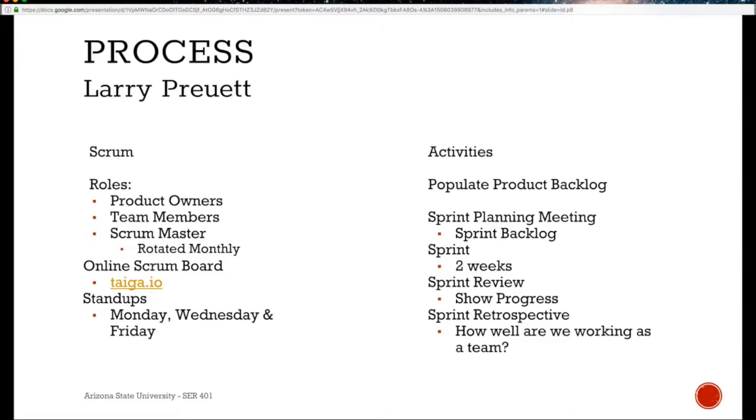Sprint planning meetings will be held to set the objectives of each sprint. Any user stories which are to be implemented during that sprint will be moved from the product backlog to the sprint backlog. The objective of sprints are to implement all functionalities described in the sprint backlogs.